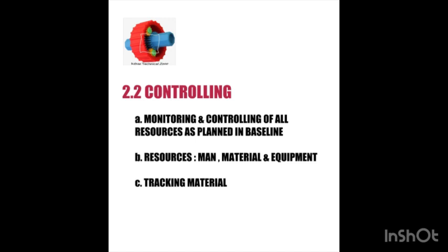Tracking of RFQ, request for quotation to vendors and suppliers of particular materials. PO tracking, PO means purchase order, tracking of regular and long lead items. Long lead items are the materials which are very critical, and without these materials we are not able to do the project. And material delivery we have to track.